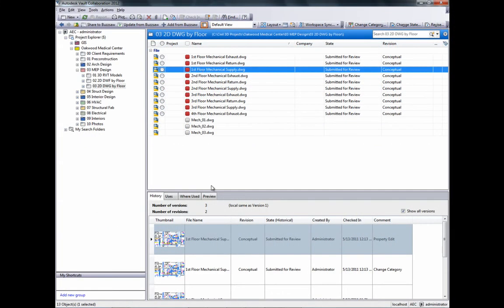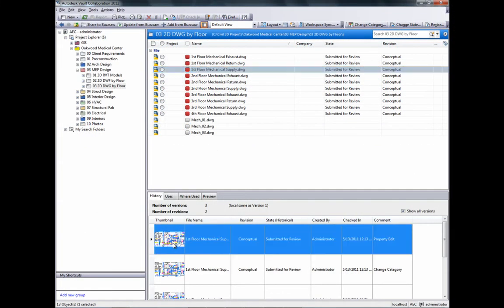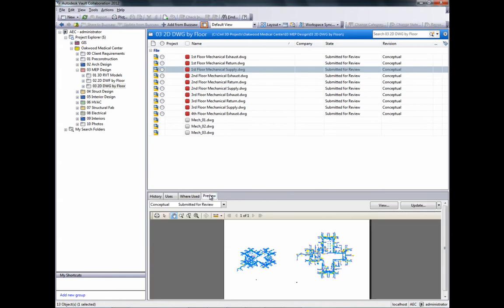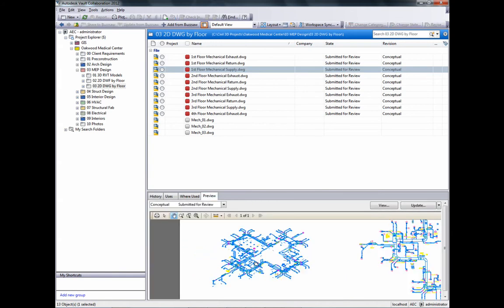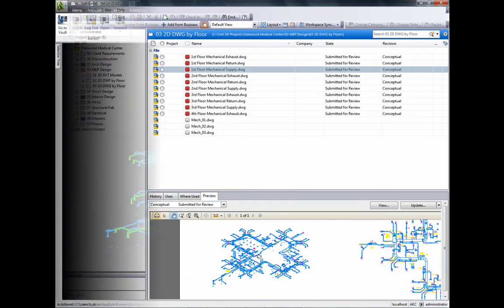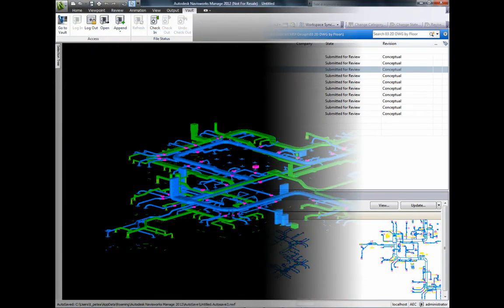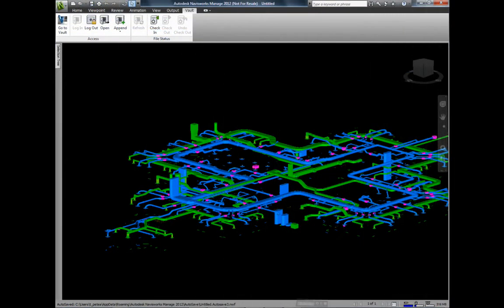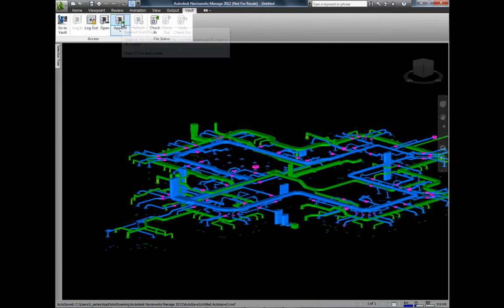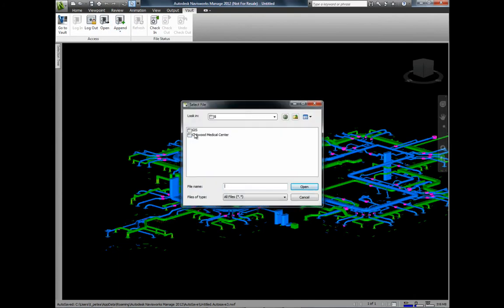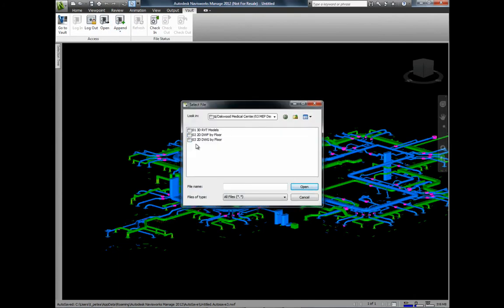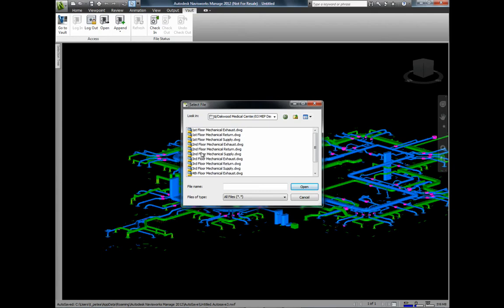The BIM Manager for the construction firm confirms that the latest version of the file is now updated in the Vault. Next, he will use Navisworks to combine this file from Vault with the other multi-discipline models to perform coordination and generate clash detection reports.